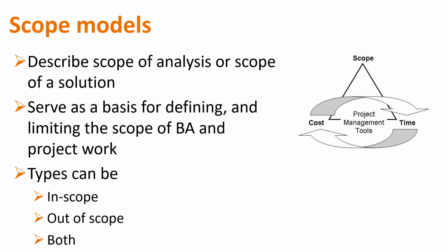I usually do both. So what that means is when we're talking about the scope, and let's say we're talking about claims management, at the very beginning in the process, I'll have boxes for any of the claims systems. Every system, I'll have a box for that. I'll have a box for the role types, like the claims person, the customer. I will show external stakeholders a little differently than I'll show internal stakeholders. And so I'll put all of that together.